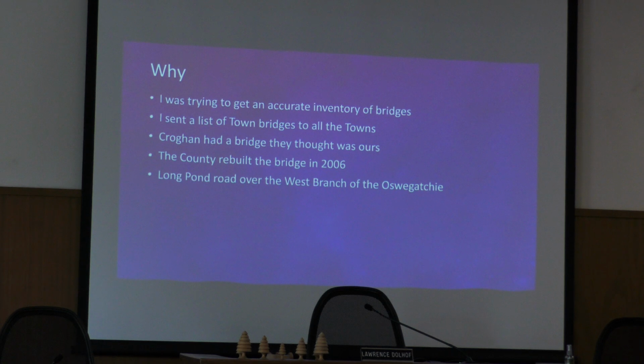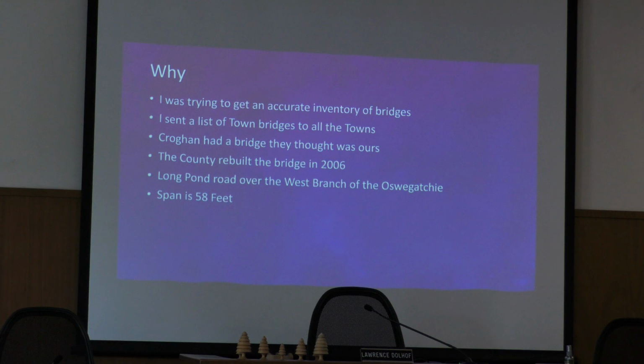It is now a much bigger span. It's on Long Pond Road over the west branch of Oswegatchie, and the span is 58 feet. So it's much bigger than the original bridge that was there. And I understand, talking to my guys, that when this was replaced in 2006, because on Long Pond Road there are no detours, they had to leave cars parked on both sides of the bridge, and they had a walking bridge so that the people that lived up there could park their car, walk across, and get in another car and go to work or get groceries.